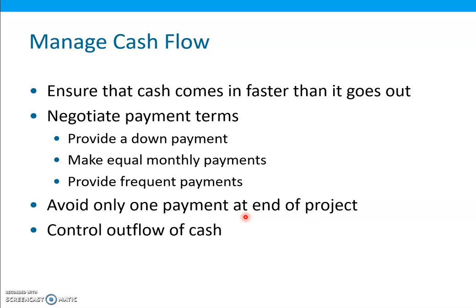Manage cash flow. It is important to manage the cash flow on a project. Managing cash flows means making sure sufficient payments are received from the customer in time so that you have enough money to cover the costs of performing the project. So the key to managing cash flow is to ensure that cash comes in faster than it goes out.